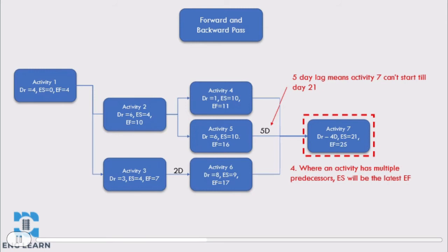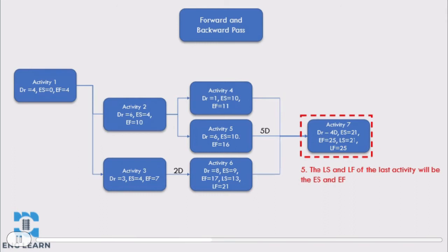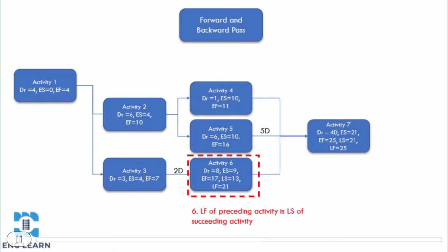This completes the forward pass, and we've now calculated the early start and early finish for each activity. This means we know the earliest any activity could start and finish when there are no delays to any preceding activities. It's now time to complete the backward pass to calculate the late start and late finish for each activity — these are the latest any activity could start and finish before it delays the project. For the last activity, the late start and late finish of activity 7 will be the same as the early start and early finish, since it's the last activity. If it finishes later than the early finish, it will be delaying the project. The late finish of preceding activities is the late start of succeeding activities.